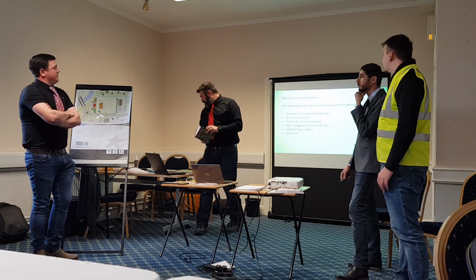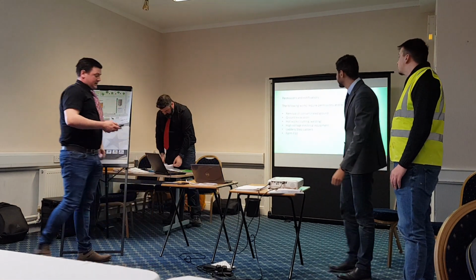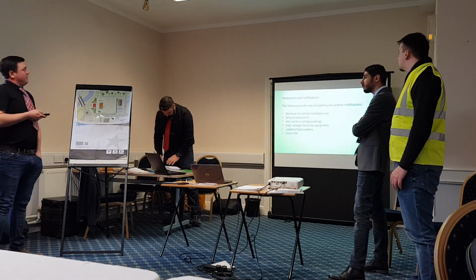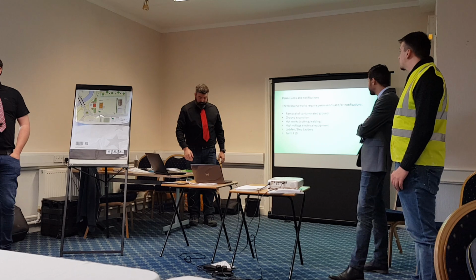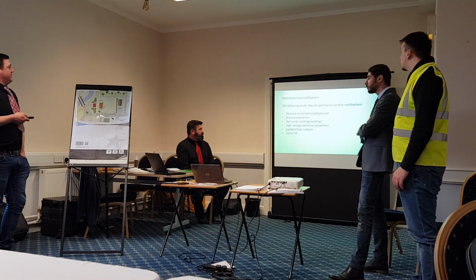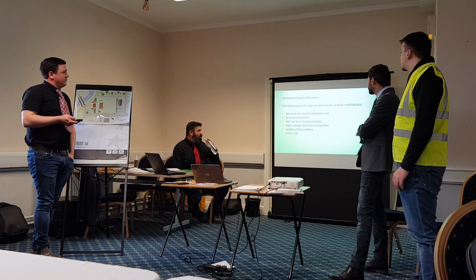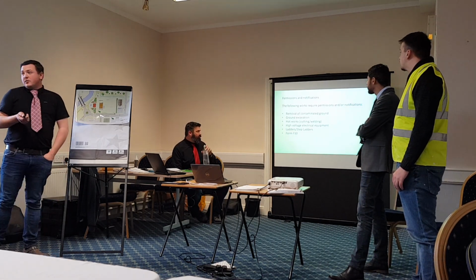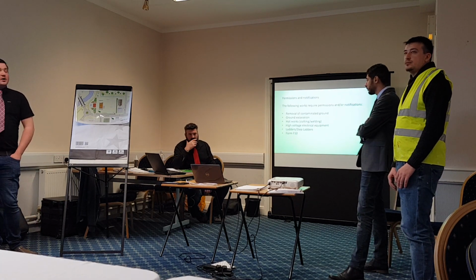So, permissions and notifications. Obviously the following works will require permissions and/or notifications. I mentioned earlier the removal of the contaminated ground, which again will be permitted work, plus any hazardous waste notes we will require. All excavations will need permits, and we will contact local utility companies, make them aware of the work that we're doing, and ask for the surveys of all the services that are on site.